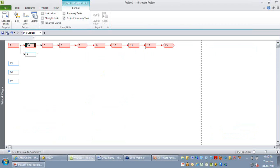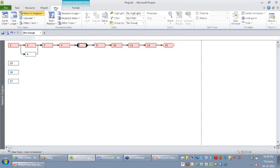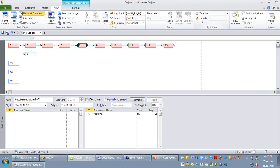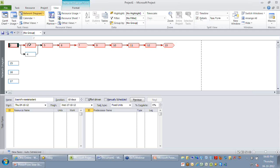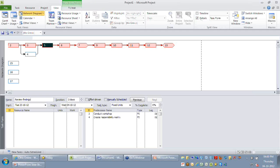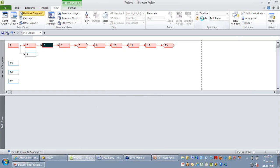Since you don't have details about these activities, you might want to split this window into two parts. I'll go to the view ribbon where I can click on details. And as I select each activity on the top, you can see the activity name, its information and its predecessors at the bottom. So this might be a quite easy way by which you can review the dependencies.